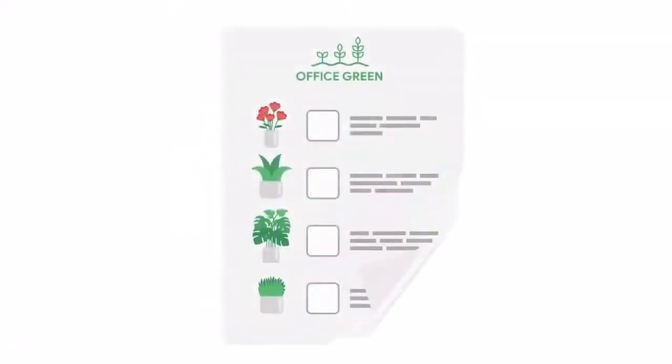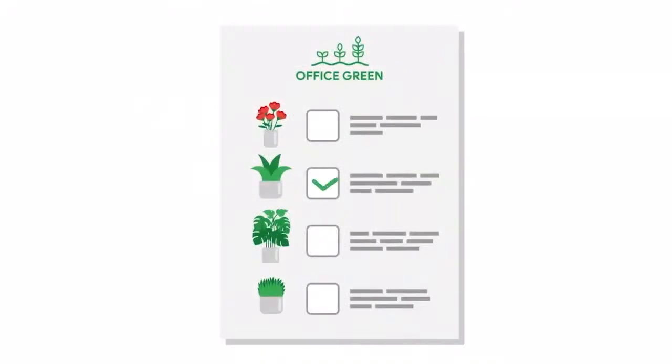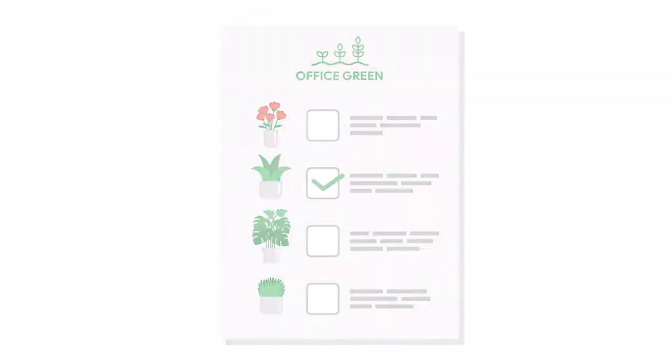First, how could the Virtual Verde team ensure they build the right thing? How do they know they're creating something the customer really wants? In this case, the team needs to ensure that they create a service providing the types of plants that customers want to buy. So they could create a survey that asks current and potential customers what their plant preferences are and the type of home office design they want to create. Then, they'll use this data to update the user stories on their product backlog.